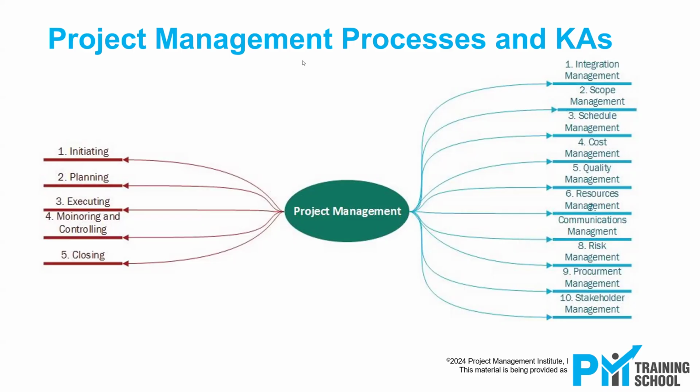One has to finish, like ideation has to finish so you can enter into the next phase. Correct. But here what happens in process groups is, when you are planning, you could have started execution in the meanwhile. While the execution is going on, the monitoring and control is also happening continuously throughout execution. Some things keep closing at several points in time.